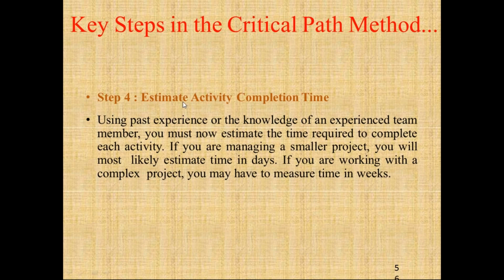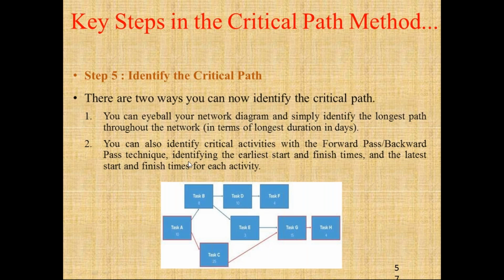Then we need to estimate activity completion time. Using past experience or the knowledge of an experienced team member, you must know the estimate time required to complete each activity. This is the most important step. If you are managing a smaller project, you will most likely estimate in days. If you are working with a complex project, you may have to measure time in weeks.